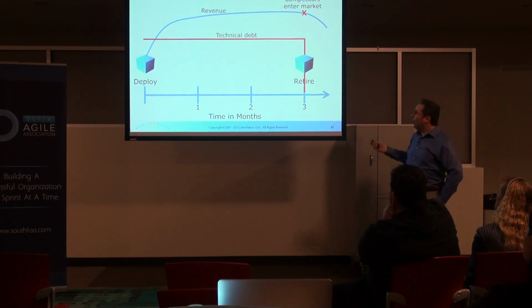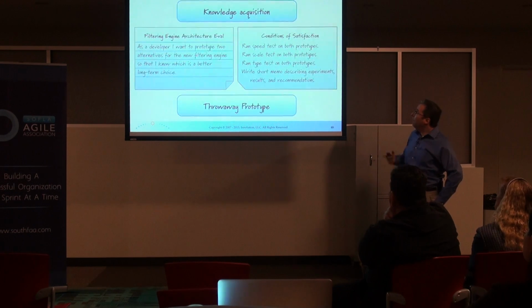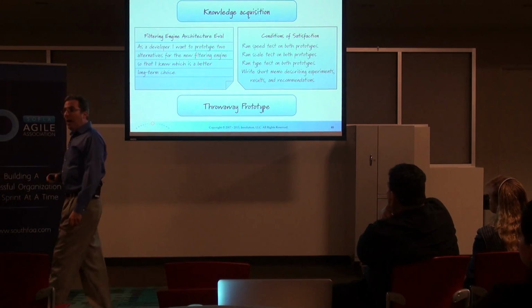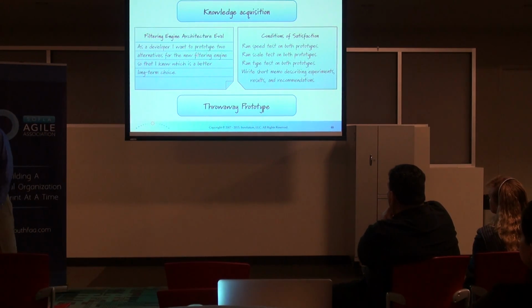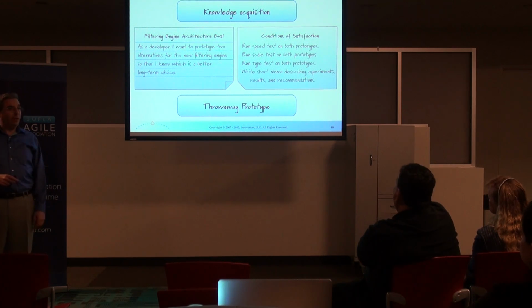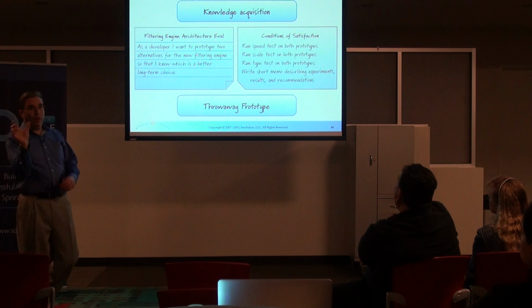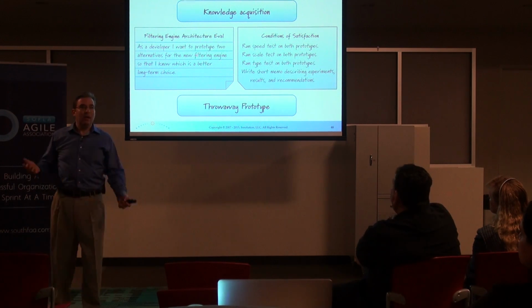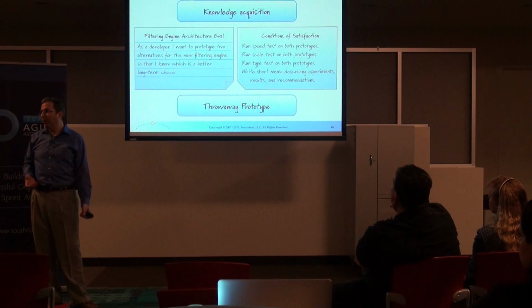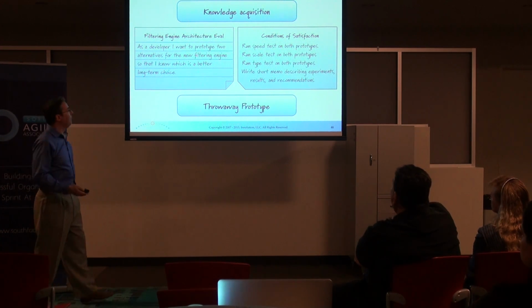So the slides to explain what I just said, and then the knowledge acquisition one. If you're not familiar with knowledge acquisition stories, they can tend to look like those. I'm okay with those in my product backlog. Sometimes the most valuable thing we can do on any project is a knowledge acquisition story. Write it, move it right to the top of the backlog, because buying that information, buying that knowledge is the next most important thing. We'll do that.